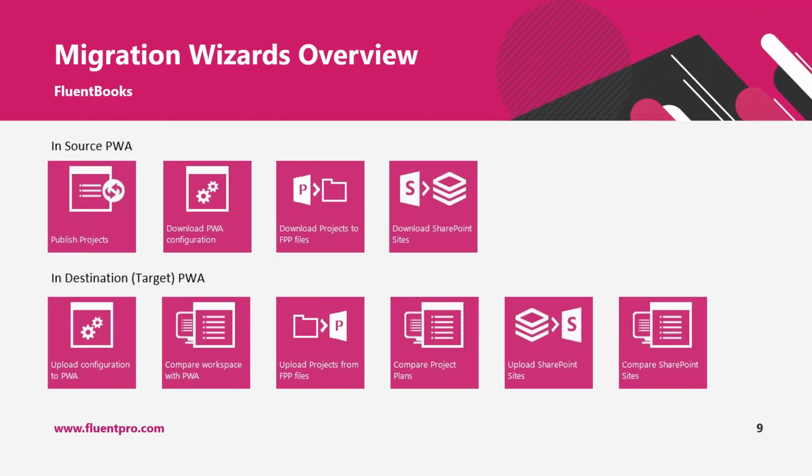Usually when we do the migration, if the source PWA is live, if it is not frozen, it doesn't really make sense to compare PWA to PWA, because if users did some changes in the source, this will show up as differences in the verification report, but these differences occurred not because something was migrated incorrectly, but because the source environment was changed.